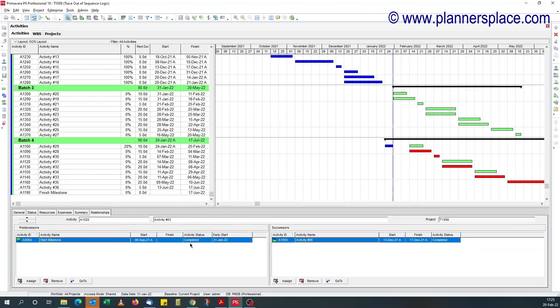And for completed predecessors, the early start date should be the data date. If it's not the data date, that's your offending activity.